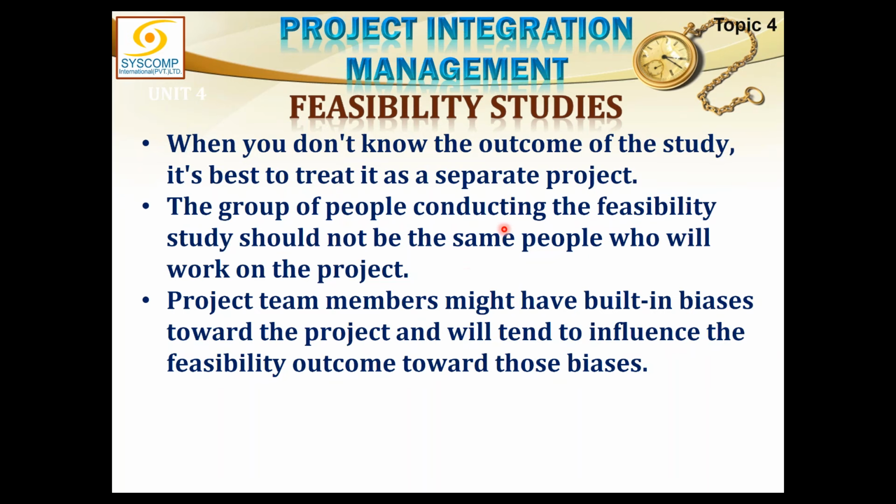The group of people conducting the feasibility study should not be the same people who will work on the project. This is a very important point, and we do not honor it normally. Why I am saying that is because normally the project manager is predefined, that this person is going to be the project manager. He is with us from the very beginning. He is involved in the feasibility.